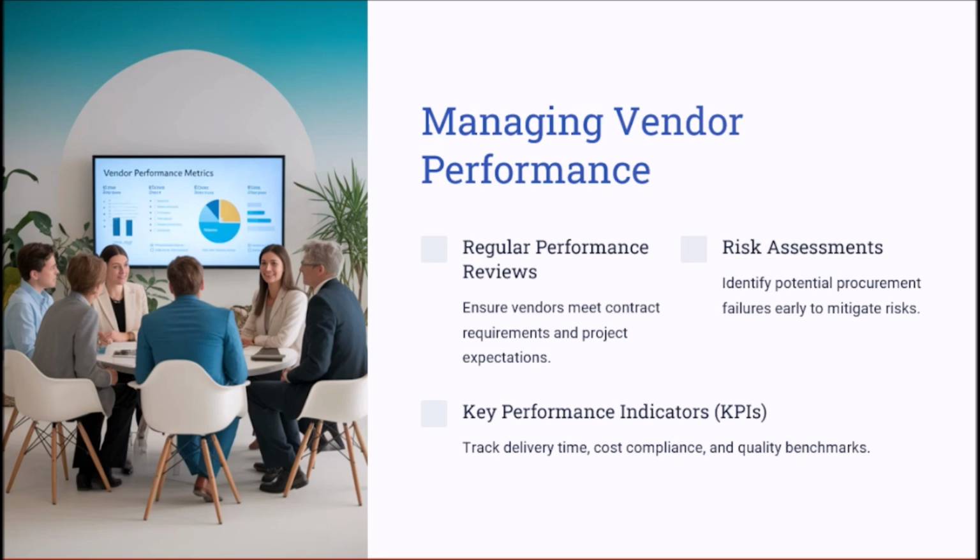Remember that when you set your quality requirements at the beginning of the project, for example, let's say that you have asked the vendor to implement a 95% accuracy model, for example, a healthcare heart prediction model. So now it's the time to measure whether the supplier or the vendor is meeting this 95%. It's a very important concept to keep measuring these KPIs against the agreed quality standards to ensure that you and the supplier are delivering results that are valuable to the stakeholders.